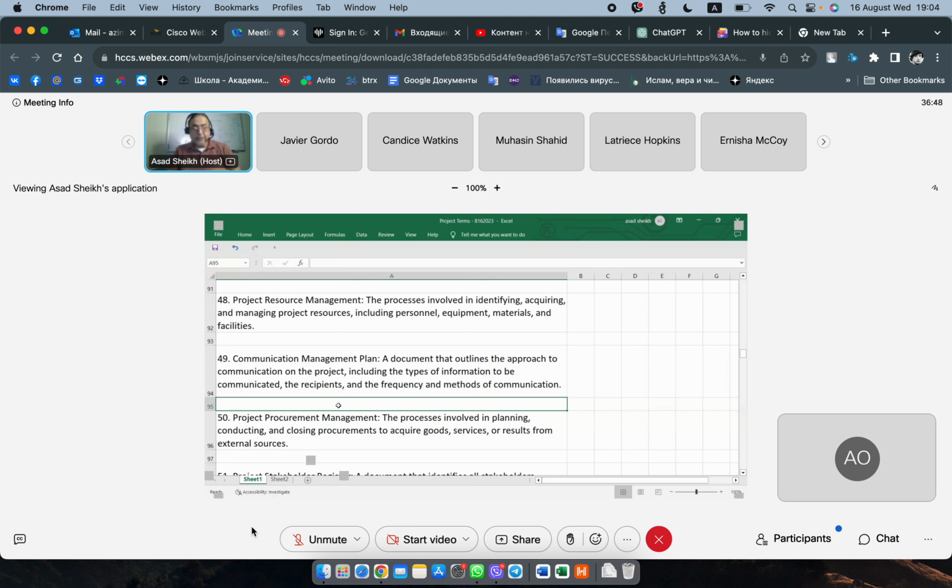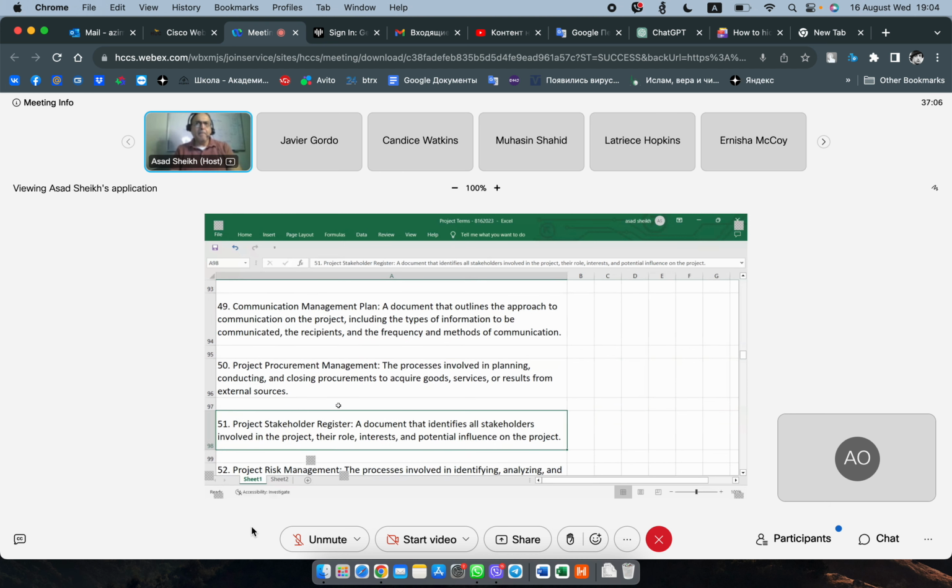What you're going to communicate: your project reports, your monthly reports, your weekly reports, or meeting notes. At a minimum, that would be your milestone report or your Gantt chart, and then who you're going to report it to and how often. Usually it's monthly to all the stakeholders, and weekly to your team members. I think it's a good practice to do that.